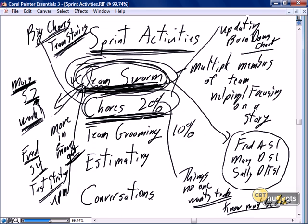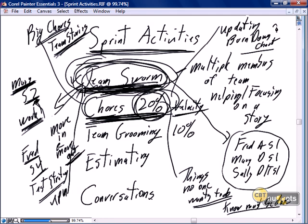The time to do these chores will become blatantly obvious through the effect of velocity. Assuming the team is always prepared to do these chores in each sprint, a lot of authors suggest the effort is around 20% — it's not insignificant. But if the team routinely and consistently works on their chores, the chore time will be built directly into the velocity. Therefore we never have to worry about having enough time for chores, because the time is self-fulfilling by the continuous achievement of our velocity.